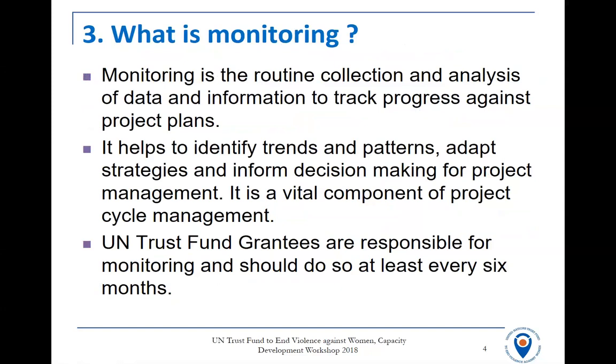It helps you track whether your project's on track to achieve the results, but also helps you identify trends and patterns and things going wrong or things going right that will help you adjust your project as you go along. You are responsible for this monitoring, and we only require that you report to us formally every 6 months online in our reporting tool, and we will have a session on that reporting tool.